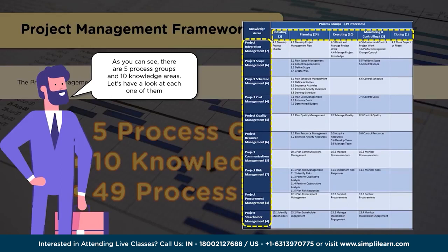Now activities in closure, a project or a phase involves just the activities of closure. The products or services or results which are created from the project do not go to closure until those are validated, checked, confirmed and signed off. Only then does it go to closing project or phase, and the necessary formalities which are required to be completed before conclusion will happen in closing project or phase. This is how the project flows.